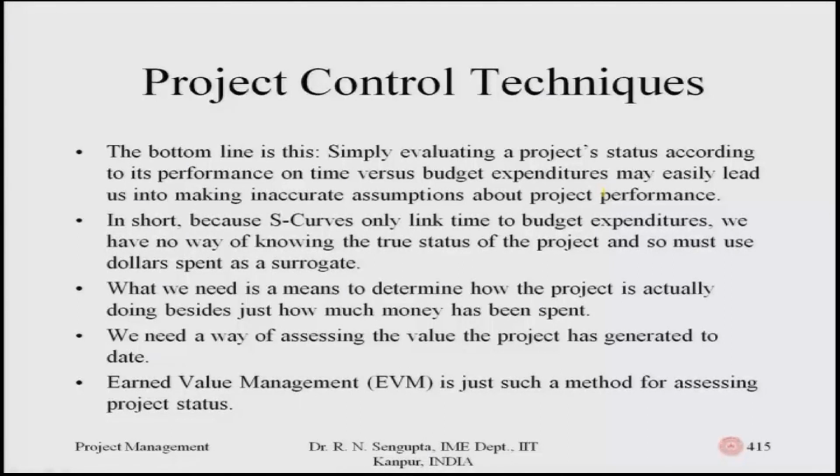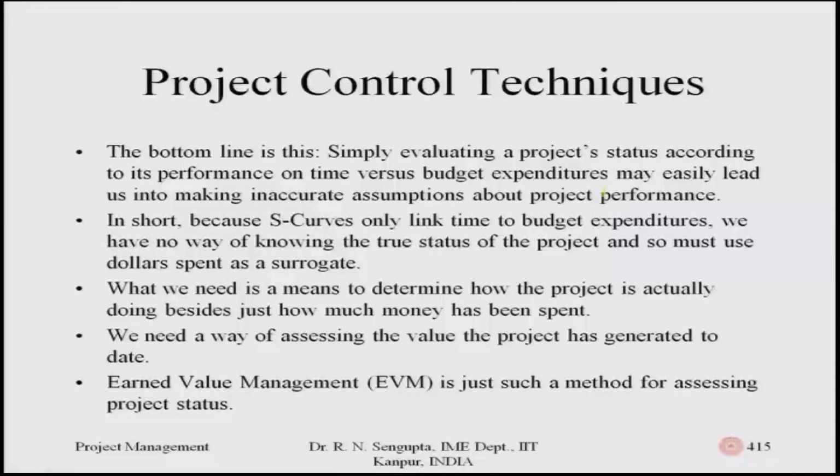We need a way of assessing the value the project has generated to date, and to balance the overall value of the project with respect to whatever our plan was. Earned value management is just such a method of assessing project status, based on which you can decide whether the actual work going on is in line with whatever you have planned.